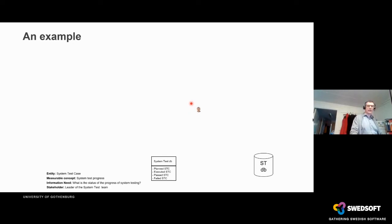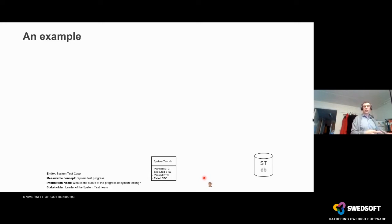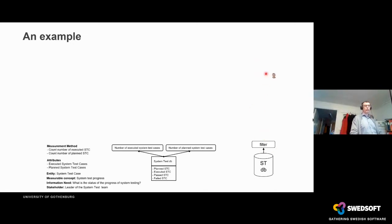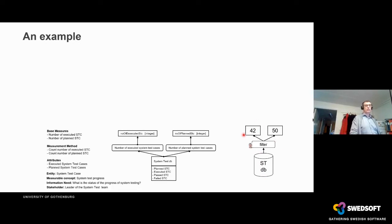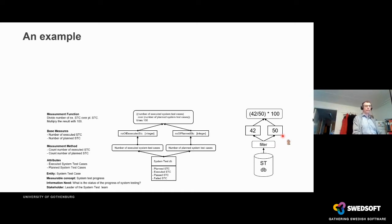Let's take a very simple example to understand the basic concepts of the measurement system. Back in the day, I had a leader of a system test team who wanted to know the progress of his team's testing. He defined that as the quotient of executed system test cases over the planned ones. I accessed the system test database, got the executed and planned test cases, and performed a simple calculation.